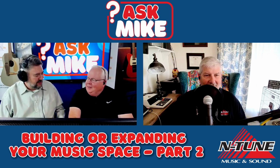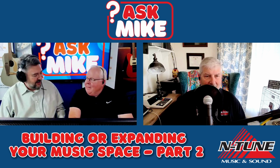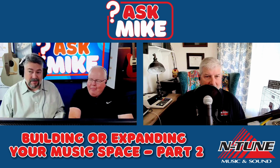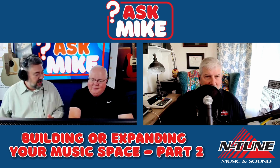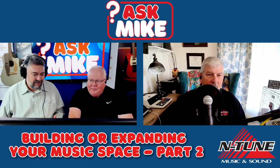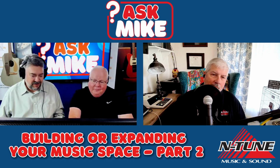Well, for one, it's a steel door, and that's cinder block around it, and that's a steel frame. And there's asbestos in that wall, and you've got a light switch right there. That's electrical. So you've just brought in almost every trade possible. They just don't understand that. And it's very expensive, especially in a construction project.